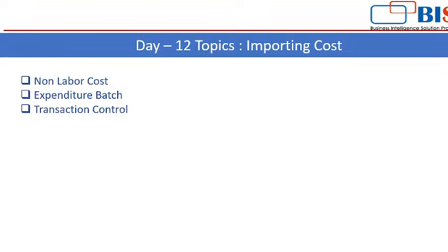So what we will do, we will create the equipment cost on the basis of hour, and it will be charged on an hourly basis. Say I have a project A that is using the equipment of the organization for 10 hours. So whatever the rate is available for that equipment, it will be applicable to that project.